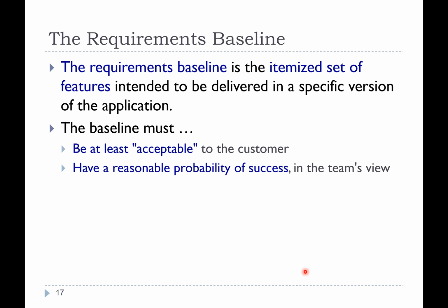And it's also got to have a reasonable shot at actually succeeding. So you don't just look at 1, 2, 3, 4, 5 and say, all right, this is my baseline. But even that, very unlikely that we're going to be able to complete it. Because if you don't, then you don't actually have something that makes even the minimum. This is where you can consider at this point, this project is not feasible. Feasible means not actually doable. We're just going to end up spending time and money, and nothing's going to be created.